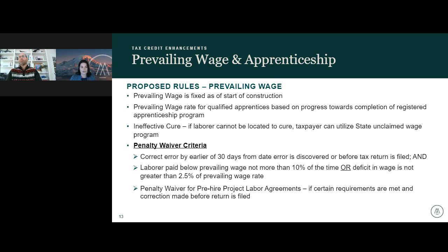One of the concerns early on was there was a scenario in which you would not be able to cure if you had a laborer that was not paid a prevailing wage, and they could not be located to pay them that back pay and interest. I think something to note here is that labor does not equal employee. So there could be a scenario where you are hiring temporary laborers, day laborers, that if down the line it's determined they weren't paid a prevailing wage, could be difficult to track down.